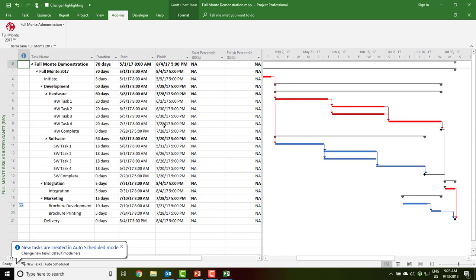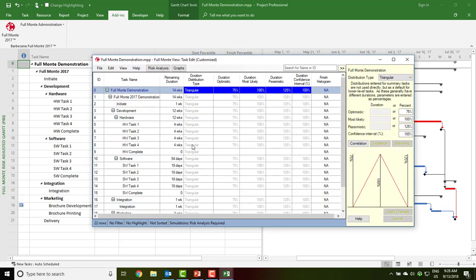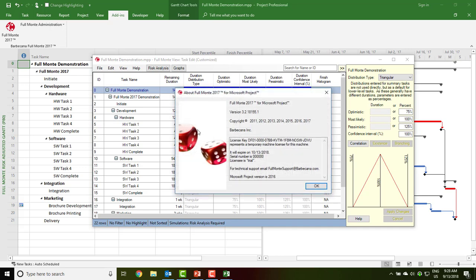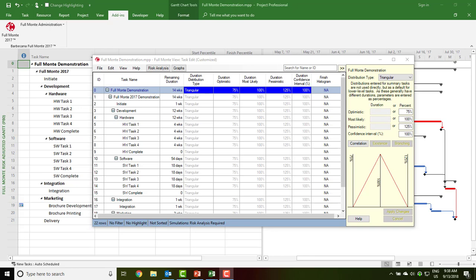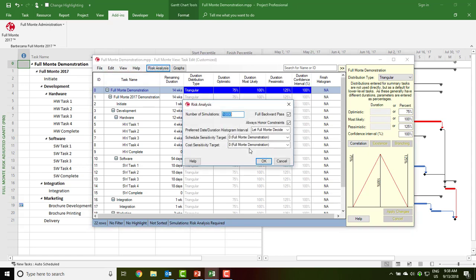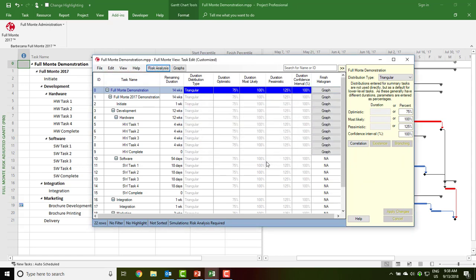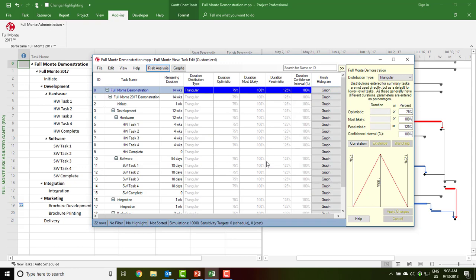We can now launch Full Monty and verify that the trial is in progress by looking at the About Full Monty dialog. It will show the date the trial will expire. The demonstration project is preconfigured with plus or minus 25% uncertainty on all task durations, so we are ready to run the risk analysis and review the results.